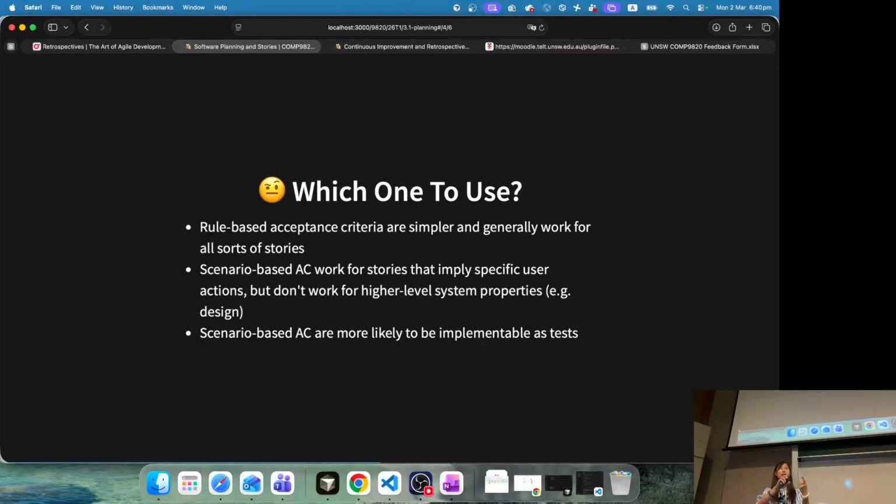It may mean like you can view the pending task. It may mean like you want to know what a task is assigned to. So this is a very good example that you can practice splitting the stories. It's very common. Like you start with a very big story, and then you start splitting them. So you know the more specific value and more specific things the users can do.